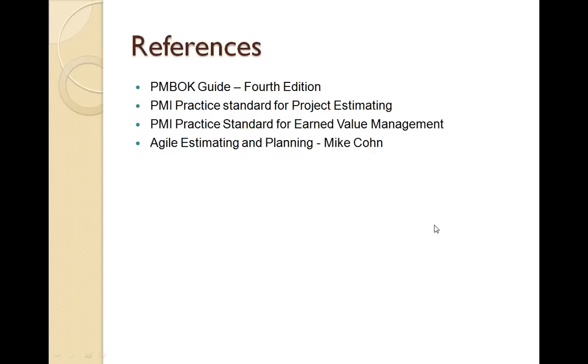So in that perspective, what typically happens is we estimate at a project level and then we roll up at the program level. The customer might have one entire program which would have multiple phases, and we are estimating for phase 1, and the project related to phase 1, we will estimate for that. But there might also be an expectation to provide estimates for the next phases, next projects which are part of the same program. In that case, you may not have enough details. So in such a case, you will use top-down estimation models, with a confidence factor attached to it, that okay, we will have the next phases completed by end of the year with, let's say, 40% probability or 60% probability attached to that.